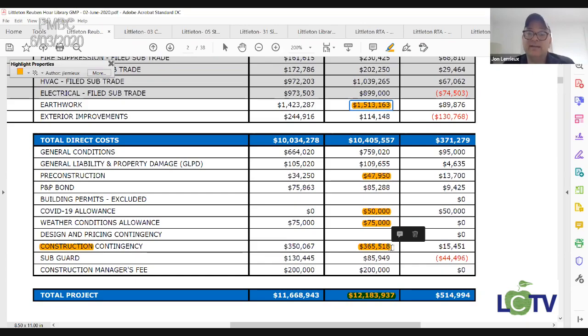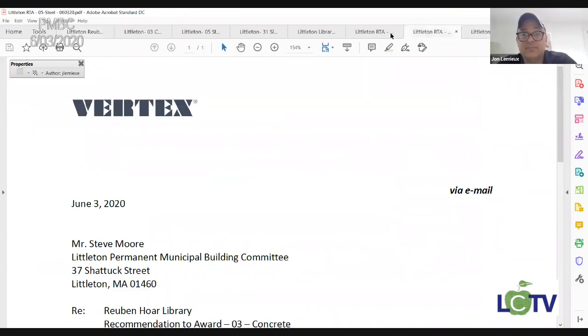So that along the way, if they do a good job of buyout and there's extra money, we will have the opportunity to not wait to the end of the job, not wait the 14 months, and maybe after site work is done, say, hey, you picked up that 100 grand, that's 50 grand. How about, let's give you a change order for it now, and it comes back into the owner's coffers to be accessible. Why is that important? And we'll talk about that next.